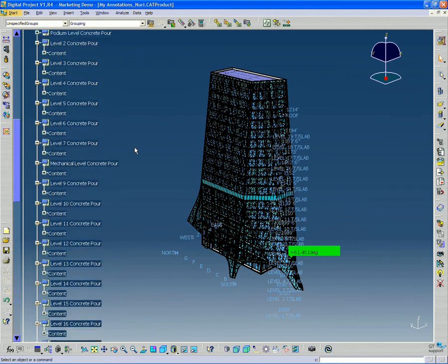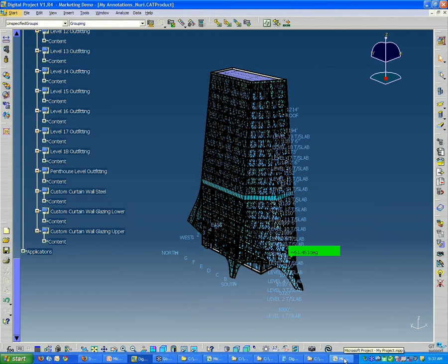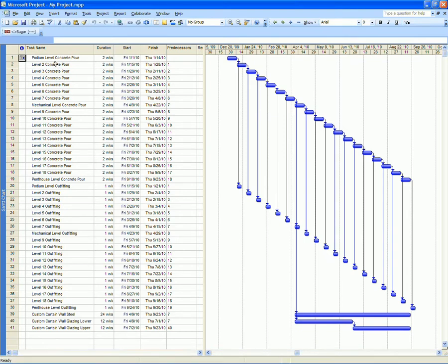So, all right, now we're ready to run a simulation of the different models as they build up through the project. As you can see, if you've worked with Microsoft Project before, all these elements are linked to each other starting in January 2010 in this case, and they're all given different durations, and they follow this Gantt chart schedule.